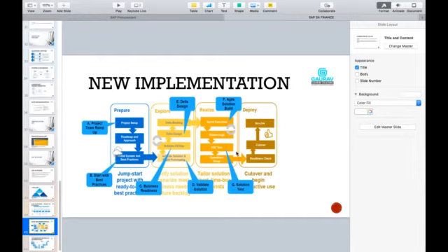Why? Because we understood the requirements and created a document, but when we performed the configuration, we did not follow this document correctly, or there may be any number of issues because of which we were not able to replicate what was expected by the customer. So you waste all those 4 months, and again there is a lot of rework. So how to avoid that?